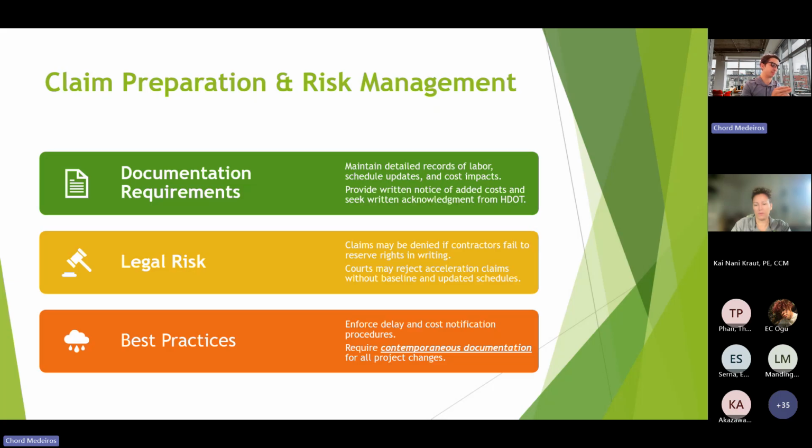They obviously have to submit it on a timely basis. They have to submit their baseline schedule and their progress schedules. We have to make sure that we're reviewing that on a weekly basis with their three-week schedules, and on a monthly basis with those overall CPM schedules. Again, I don't want to go into too much detail, but that is of the utmost importance when courts are reviewing claims: they look at the baseline schedules and progress schedules and determine what is fair.